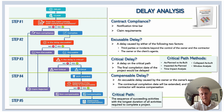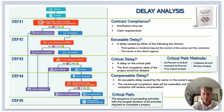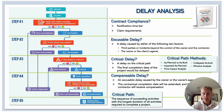There are approximately five common methods of critical path delay analysis, and they all rely on project schedules or programs. Some methods are better suited for specific purposes than others — be on the lookout for future videos on how to apply these methods. In assessing criticality, we determine whether the delay impacted project completion and the extent of the delay, typically expressed as the number of days the project was delayed by the delay event.